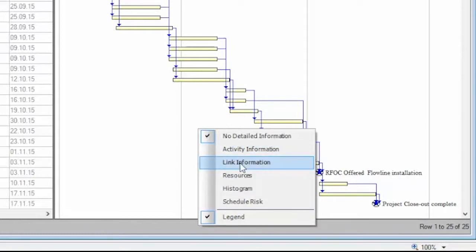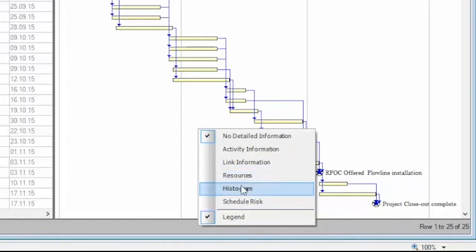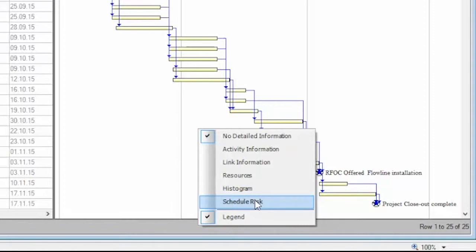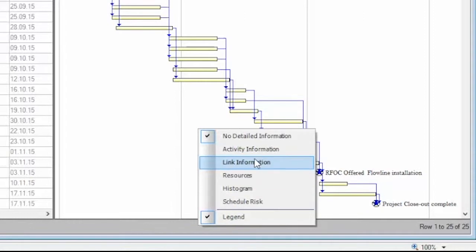You can link information resources with a graphical display, define histograms, create reports, and perform schedule risk analysis in Saffron Planner. When you update information in the information area, it automatically synchronizes with the activity you have selected in the bar chart.